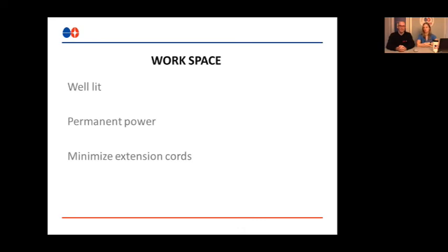Also, a workspace that is clean, has been prepped. We'll come in a minute to the floor spec, but an open, clean workspace that is ready to go from day one is really important. We've arrived at sites, unfortunately, sometimes when the space isn't quite empty, so we have to take a couple days to help prep it, which unfortunately can slow things down, but just having an open space, clean and ready, is ideal.